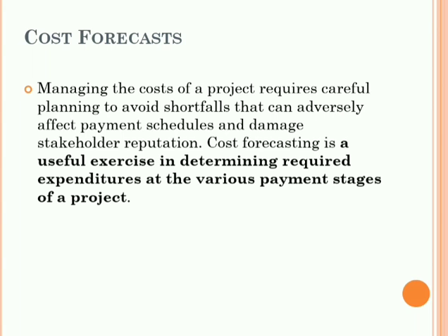Here, let us see one example. The project requires 100 MT of steel, of which 50 MT has been ordered and 50 MT of steel still needs to be procured. Therefore, the total cost forecast for the steel on the project will be the committed cost of 50 MT steel plus the to be committed cost of 50 MT steel, meaning committed plus to be committed.